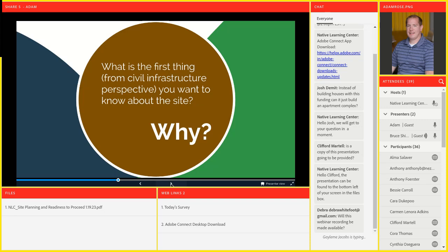We wanted to fast track it so that as soon as we got the city council approval, we could get the construction drawings approved very shortly after, instead of waiting until council approved it to start working on the construction drawings. We did them concurrently. Yep. So that's why we were able to pull building permits before the end of 2022, which was part of the tax credit requirement.